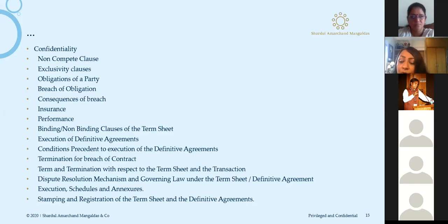So different kinds of insurances get crafted for different kinds of risks, where you have taken on a project and it overruns time. For example, if you're looking at a metro project in Mumbai and it gets stalled, the minute it gets stalled, everything goes offline. Why? Because the cost of financing keeps piling up, and the cost of raw material goes up. So the project cost itself gets escalated. Unless you have buffers and necessary insurances covering this escalation in cost and price, it is extremely hard. Projects and companies have undergone severe losses.